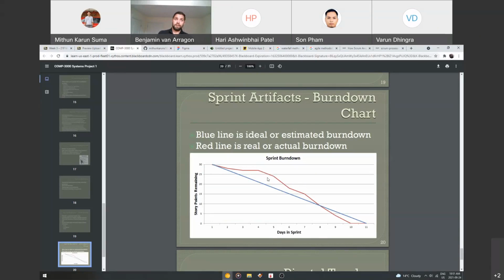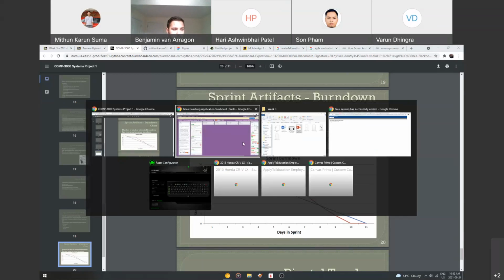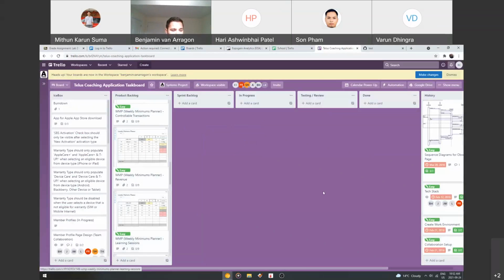So say you have 5 boards or 5 user stories. Story points you basically assign to each user story. You typically would want each sprint to have something like 30 points in it. And you know how I showed you guys that example with the easy, the medium, and the hard tasks?